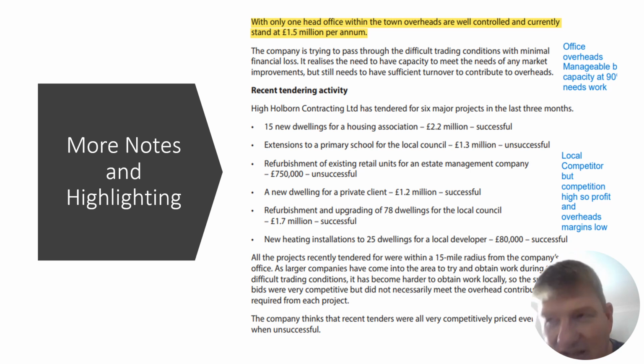It's quite manageable. It works out at around 6.8%, so it's around 7%. So head office overheads is around 7%. That's actually pretty good. It's quite low, but that's because they're a local firm. If they were a national or a regional firm, their head office overheads obviously would be much greater. Because they might be based in London or in a big city like Birmingham, where the rents, the mortgages, and property prices would be really, really high. But they're a small local company or a middle-sized local company. So the beauty of that is it allows them to be competitive within that location.